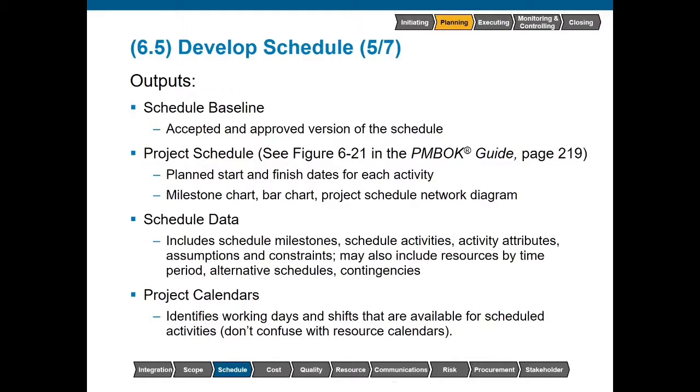So think about your organization. If you're only allowed to work Monday to Friday and you have to go ahead and scratch off federal holidays, or perhaps you have other periods of mandatory training requirements, whatever else it may be, then you'd only have certain periods that you'd be able to go ahead and complete scheduled work. Anytime we see that word calendar, I like to think about availability, just like with resource calendars. When are your resources going to be available for project work?